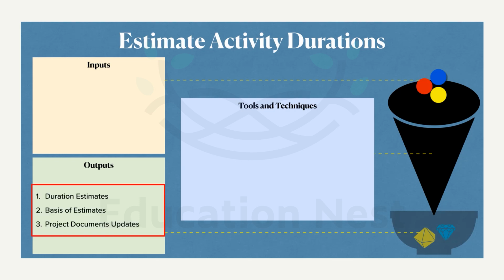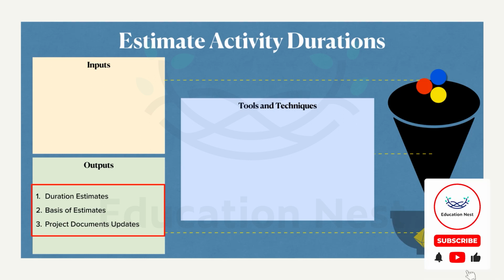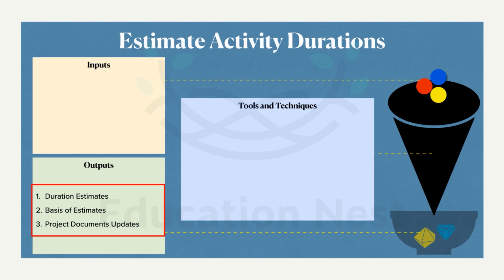Duration estimates. The time estimation of each activity is this task. Like, activity A can happen in 3 weeks, plus or minus 3 days. Again, not just plus or minus 3 days. We should also mention what is the chance of success or chance of not getting success. So all those things are captured here in the estimates.